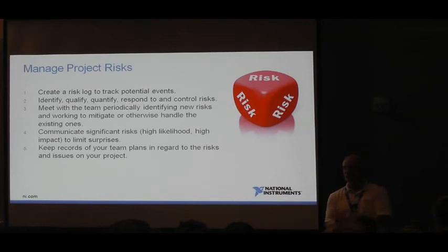Talked a little bit about risk. Again, you can have a risk log, identify, quantify, qualify which of the risks that you're tracking, communicate those, keep records of how you did. Did your mitigation strategy work? Were you able to come to a successful resolution for the issue? This can help on future projects when you look back at the log.